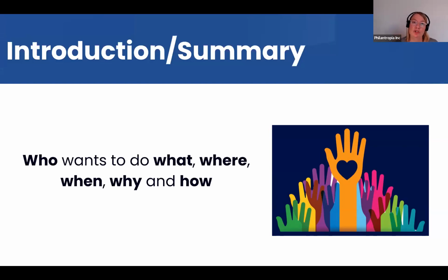The summary shouldn't be the first thing you write, even though it's in the beginning, obviously. Often while you develop a proposal, and especially if several people work on it, you will make changes. So if you write the summary first and then stuff in the end changes, sometimes it doesn't get reflected properly in the summary. But you should also not write it last minute. That's something very common. We always see typos or sentences that are not correctly finished. That happens if you write the summary just last minute.